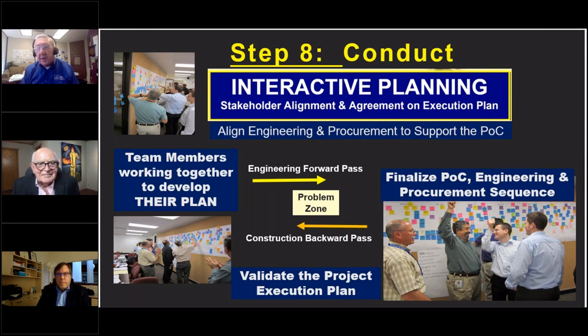You don't just go into an interactive planning session, but notice the little stickies down there on the wall on the bottom corner. We actually get the disciplines in there with stickies. We want the disciplines. And the big danger here, guys, is you get a project controls person in there, and he's going to facilitate this, and he's going to try and make a schedule out of it. No, don't get a scheduler in there to do this. Get the guys who are actually the engineers, each discipline, civil guy, structure guy, piping guy, process engineer, they all need to have their color stickies, and they need to get in a room.